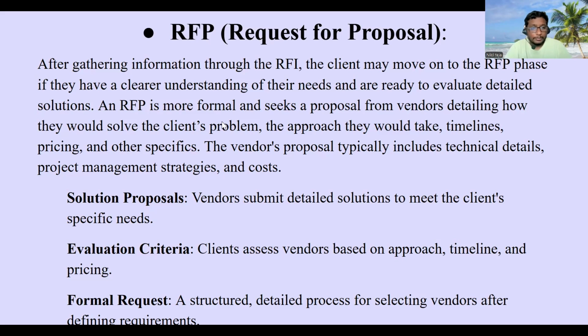Let's see what are the points here. Solution proposals: vendors submit detailed solutions to meet the client's specific needs. As I said before, the client has some problem and vendors will be sending the solutions and some strategies in a detailed document. Next is evaluation criteria. The client assesses vendors based upon the approach, timeline, and pricing. So the client will be testing based upon their reply, so that he can cut off some more vendors and go to the next step.